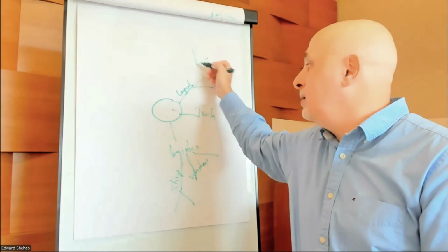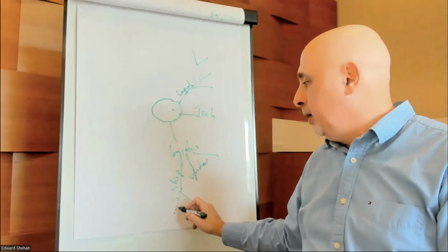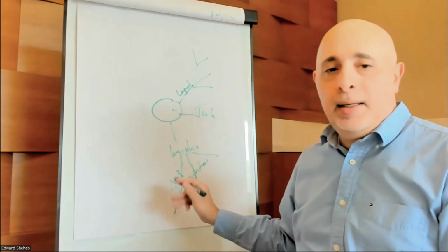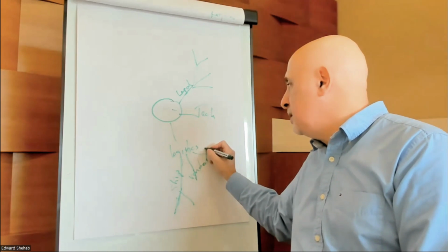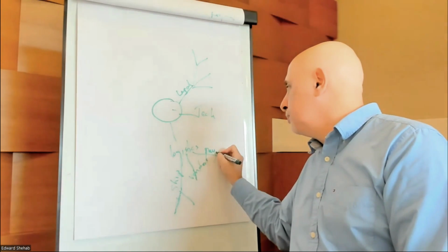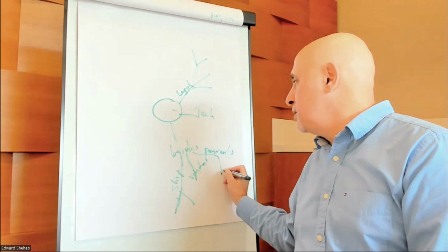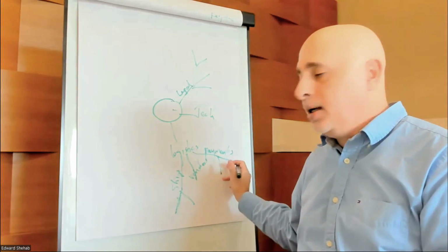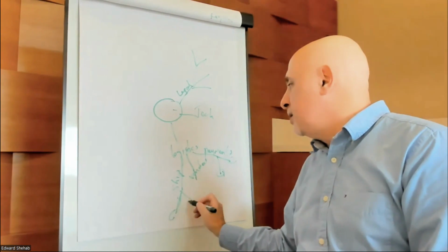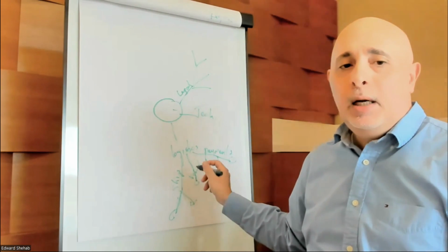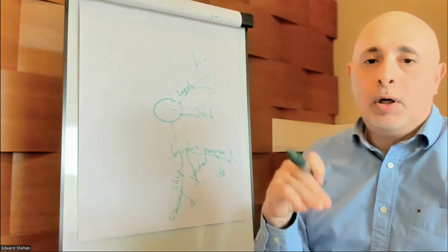And then at the end, every one of these is going to be a nice little subset that you feel could be an area where you can have risks, right? So logistics, you can talk about payments here, for example. And then in the area of payments, you can say payment processing and maybe something else. And then you say, okay, what could go wrong with that? And what could go wrong with this? So at the very, very tips here, you need to identify what could go wrong. And those are the things that you'll put on your list, right?